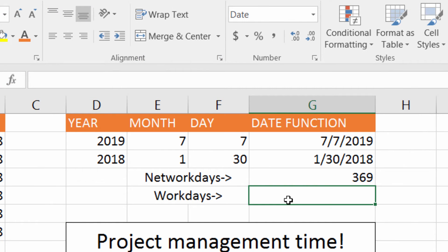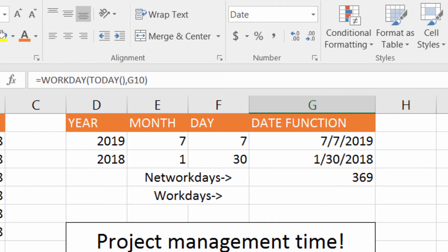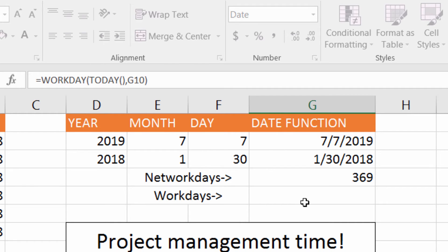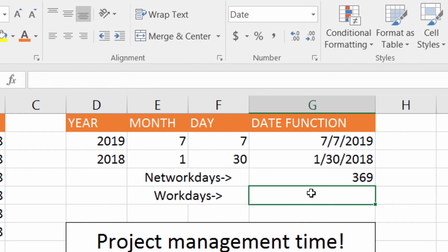The Workday function will return to you a date after the current date. So down here I was using TODAY, but what it's actually calculating is starting from tomorrow — it starts the project tomorrow. It doesn't really factor in today because it's looking for how many whole days you have to work on your project.